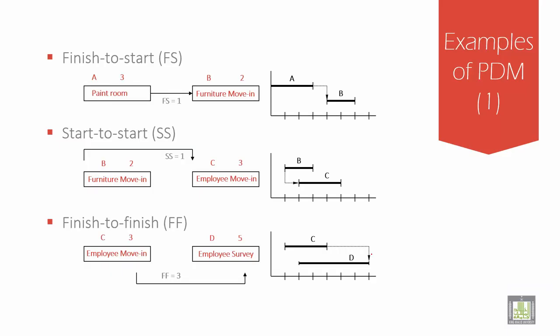First one here, finish-to-start is a logical connection in which the successor activity cannot start until the predecessor activity has finished. For example, the paint room is A3. We have a delay, a lag time of 1. This starts from here, 1, 2, 3. Then it has a lag of 1. After finishing this lag, it starts with 2. This is that lag, that 1.